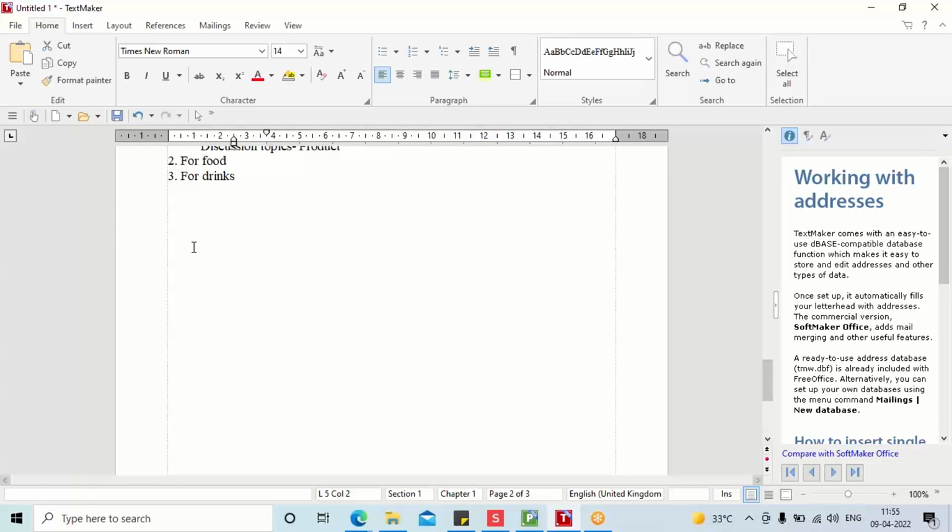So the sprint planning meeting focuses on prioritization only: the business value, the complexity points, velocity, what is the load of the team, how much work the team can take. That kind of discussion happens in the sprint planning meeting, and that is what is put forward in the sprint. Clear, guys? Any questions?